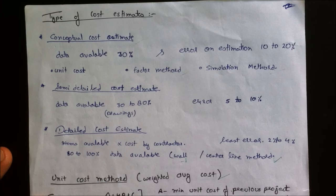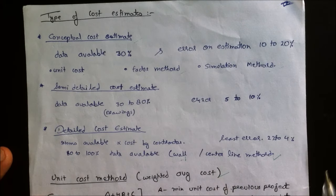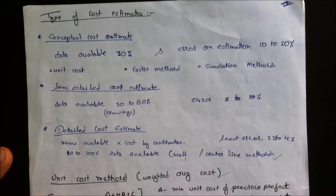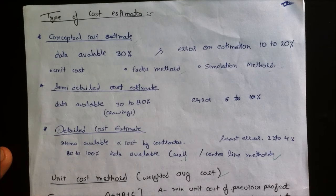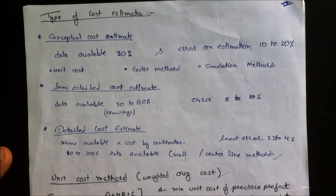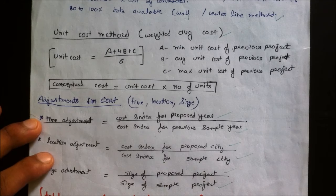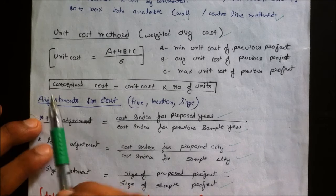In the semi-detailed cost estimate, the error is 6 to 10%. The detailed cost estimate includes each and every item — cost of the contractor and labor cost. It is done using the wall method or centerline method, and the error is very low.